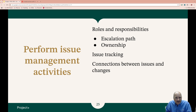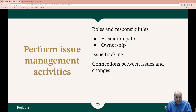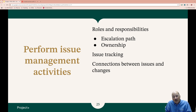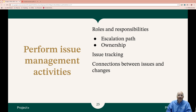One of the things with issues is that oftentimes we have to address them. In addressing an issue, we change the project. In changing the project, that might add additional time — and by adding additional time, we might eat into when people were going to start taking vacation, which can cause additional issues. Changes to the project can cause additional issues, which cause additional changes. It can snowball.